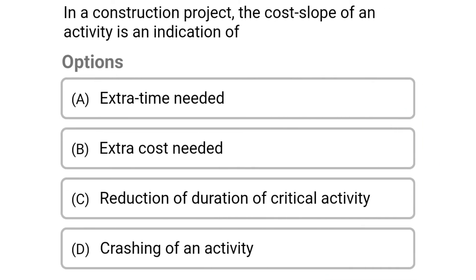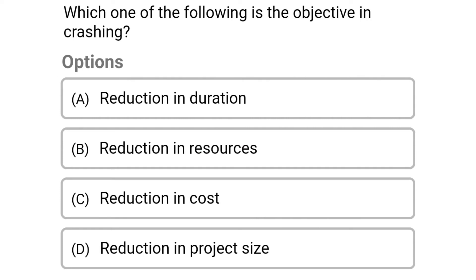Next question: in a construction project, the cost slope of an activity is an indication of — option A: extra time needed, option B: extra cost needed, option C: reduction of duration of critical activity, option D: crashing of an activity. The correct answer is option B: extra cost needed.